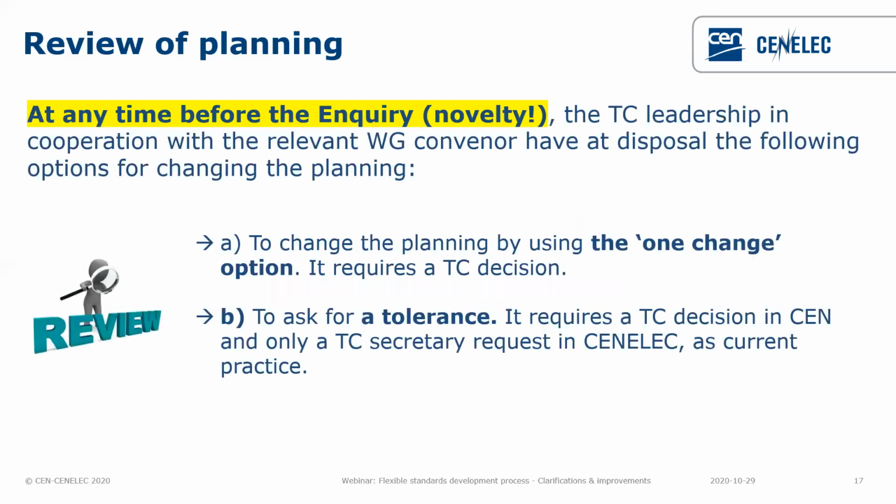Okay, Constant. Yes, thank you, Alberto. And about the review of the planning, indeed, that's something important for you to know, because you may remember that in the previous webinars we mentioned that the technical bodies had to wait 4 weeks after the first working draft to be able to introduce any change to the planning, to the initial planning actually.